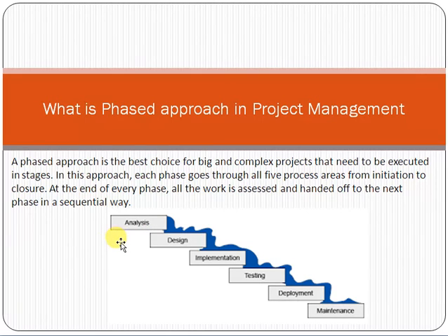And remember, the waterfall model is normally used when projects are bigger, risk factors are high, and a high level or detail level of planning is required. So normally we use the phased or waterfall approach in those cases. The risk factors are also very high in a bigger project, so a detailed level of analysis and design is very important here. These phases, analysis and design, are the pillars of the waterfall approach. If these phases are properly managed, there are high chances that your project can be finished successfully.